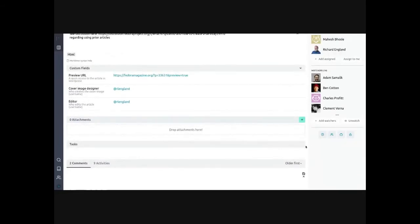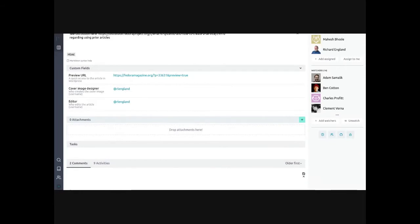You can create tasks, which are basically sub-components of the user story. There's no hard and fast rule about when something is a user story versus a task, but for example, when we have a Fedora Council face-to-face, I'll have a card for that with tasks underneath like: schedule it, prepare the agenda, do the video readout after the fact, and publish the community blog post. Those could each be their own cards, but since they're tightly related I choose to have them as tasks.